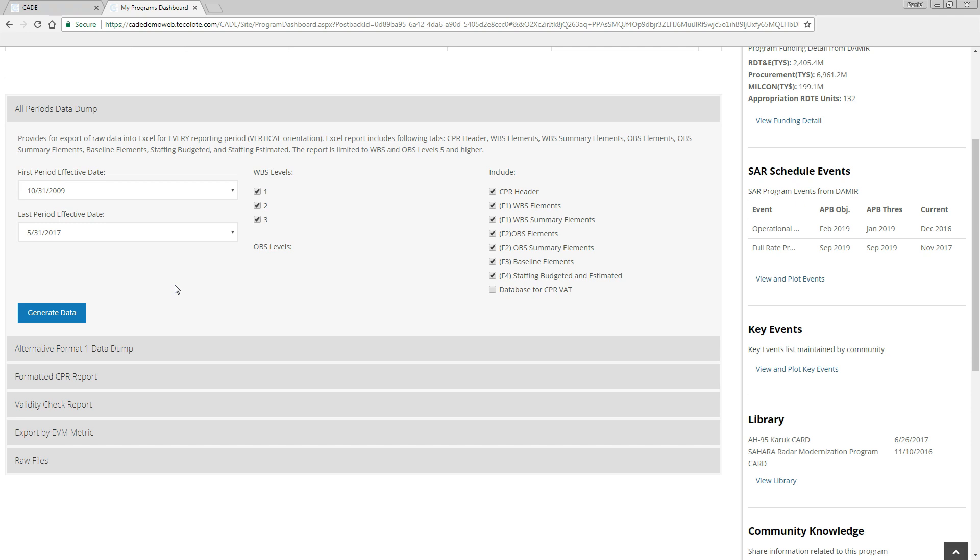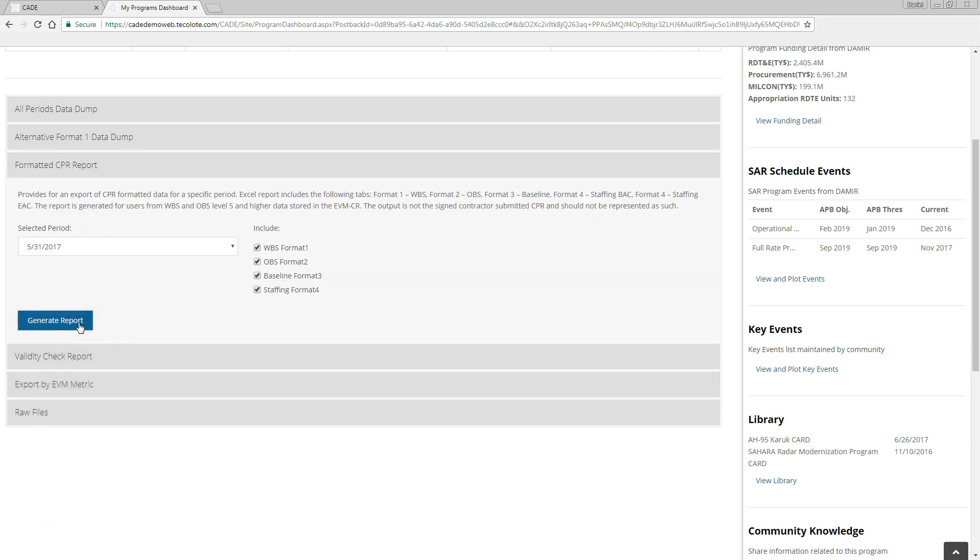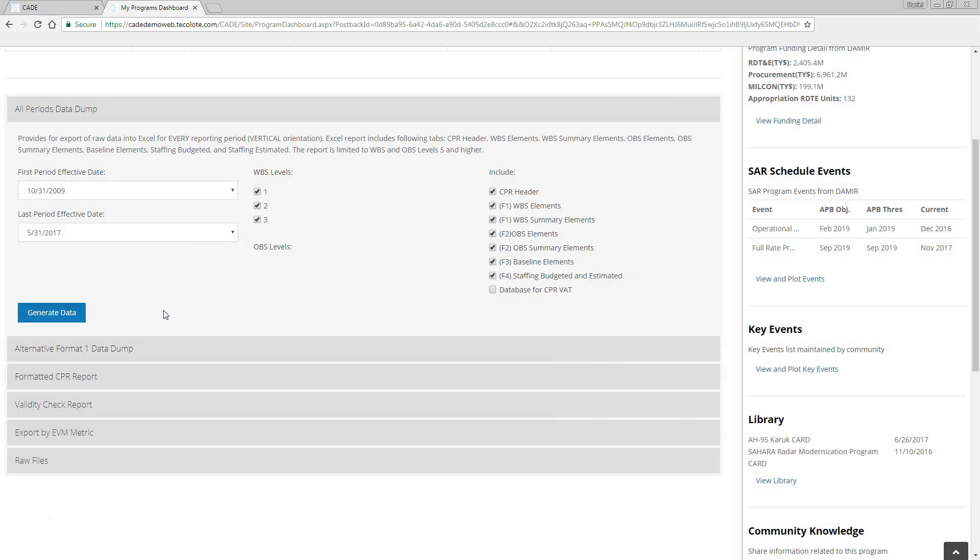To export as a formatted Excel file, click on the Formatted CPR Report section, make the appropriate selections, and click the blue Generate Report button to generate a job in the queue. Note that this will only give you a single monthly report at a time, in the traditional format that many analysts are comfortable with.